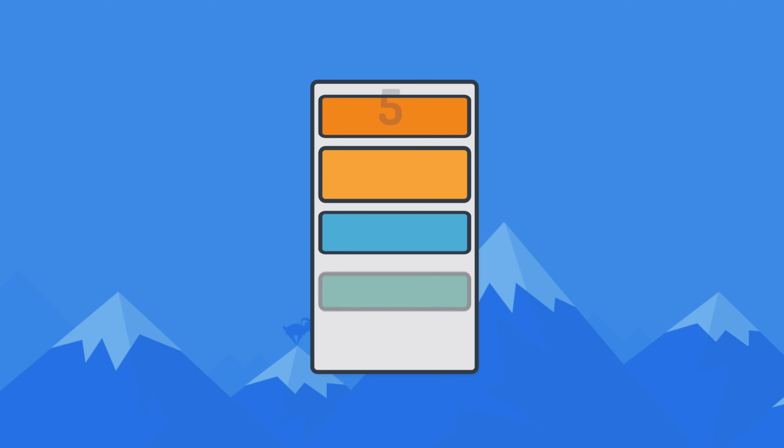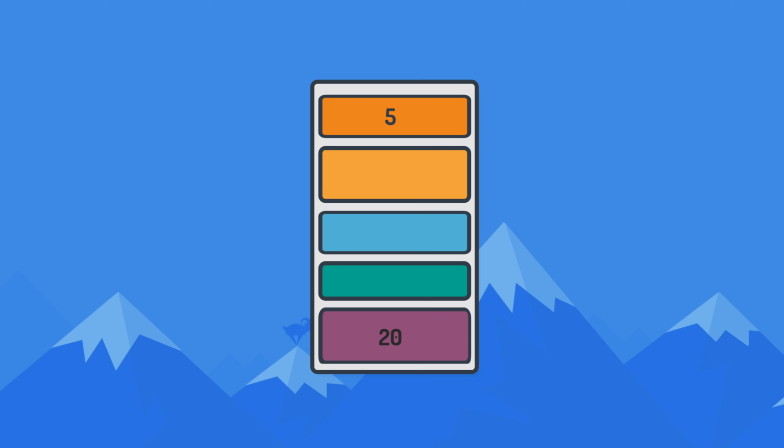Regardless of the unit in which a team estimates their product backlog items, that cost to develop and support a feature should factor into an item's priority. For example, an item that a team estimates as 5 should be prioritized higher than a feature estimated at 20 if all else is equal. This is true whether these are story points, person days, person hours, ideal time, or any other unit.